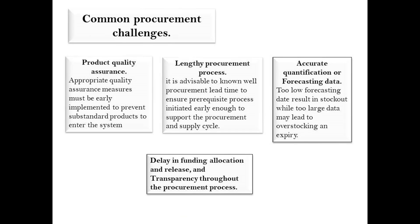Common Procurement Challenges: Product Quality Assurance — appropriate quality assurance measures must be implemented early to prevent substandard products from entering the system. Lengthy Procurement Process — it is advisable to know procurement lead times well to ensure prerequisite processes are initiated early enough to support the procurement and supply cycle. Accurate Quantification — too low forecasting data results in stock-outs, while too large data may lead to overstocking and expiry.